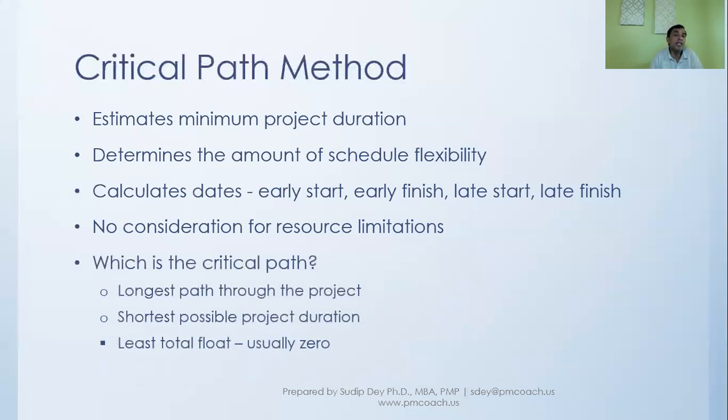One is that it is the longest path through the project, longest in terms of duration. Because it is the longest path, it determines the time the project will take, or the shortest possible project duration.